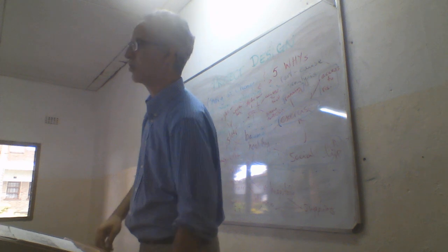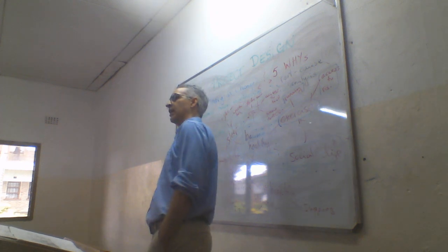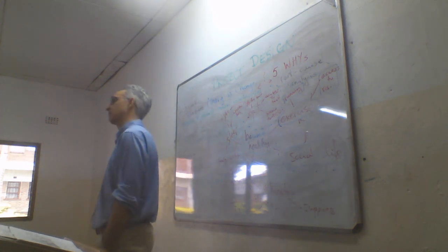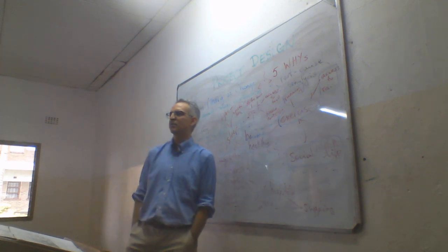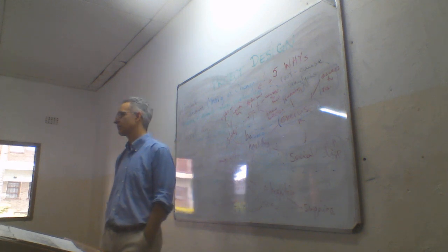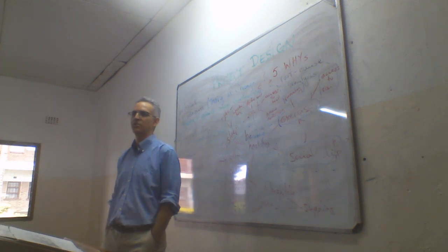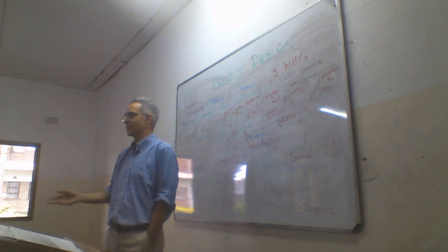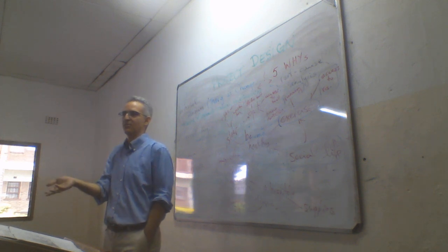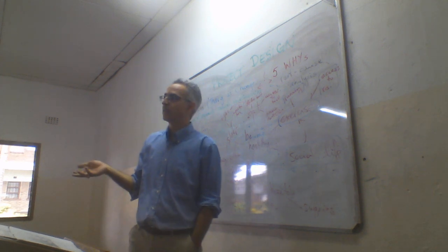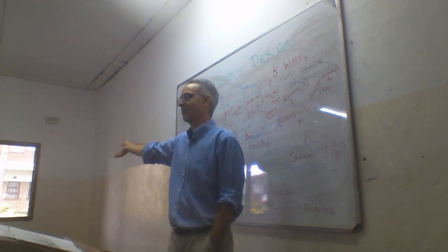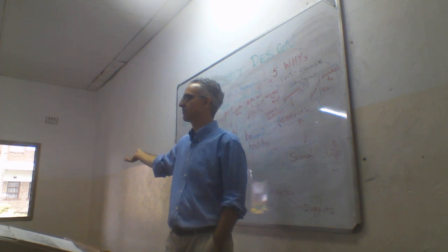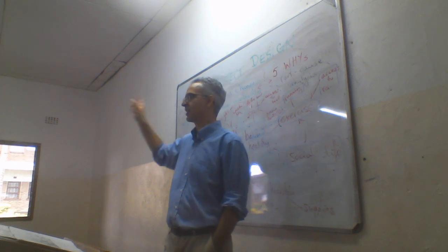You ask them, was your project successful? They say, yeah, we trained 100 teachers. You say, what was your project about? Increasing literacy. Okay, telling me you trained teachers doesn't tell me whether literacy has improved. It just tells me you trained teachers, which is good. But did those teachers then increase the literacy? No. Those are two different kinds of indicators.